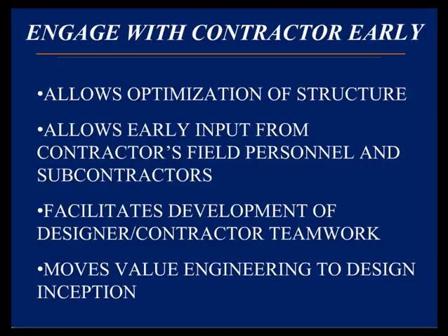For example, if you're working on the West Coast and it's a concrete building that you're designing, you'll find that most West Coast contractors have lots of experience with cast in place concrete and a lot less experience with precast concrete. In other parts of the country, for example, the Midwest, parts of the East, and in Florida, precast concrete is stronger.